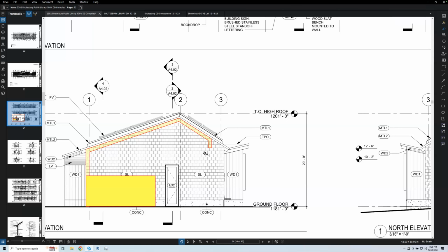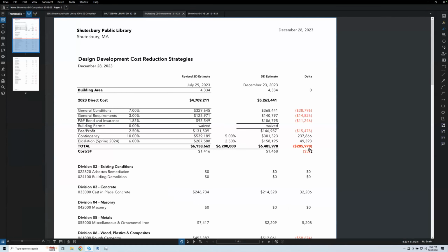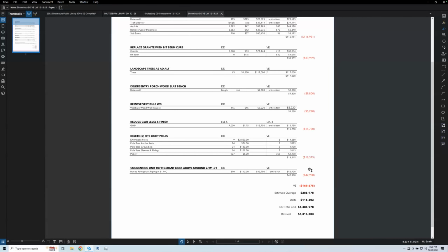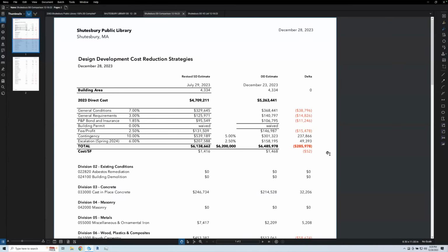All right. My understanding is that, even with these VE items, we're still many hundreds of thousands of dollars off. The estimate in August was 6.2 million, and what are we at now? 6.3. So we are only 100, it depends on our utility, and hopefully we could do something with the landscape. Are we open to ideas? Always.